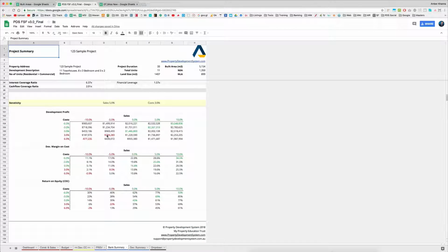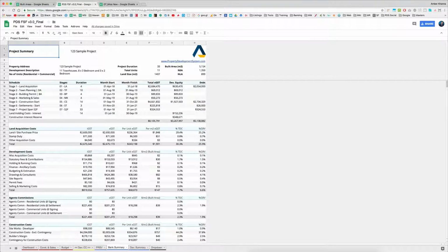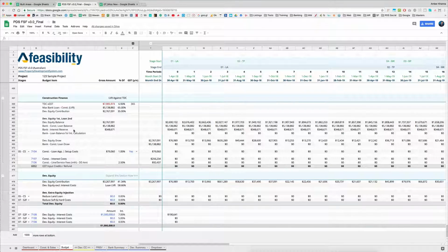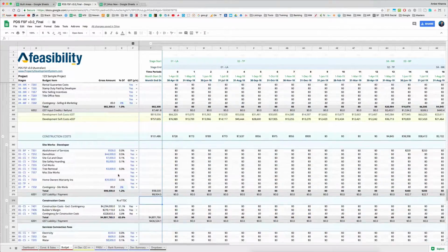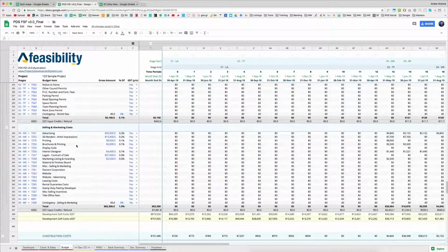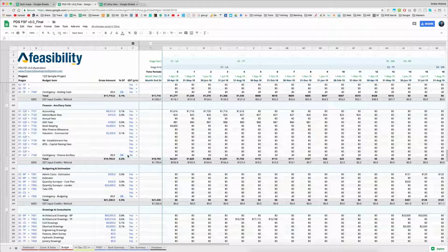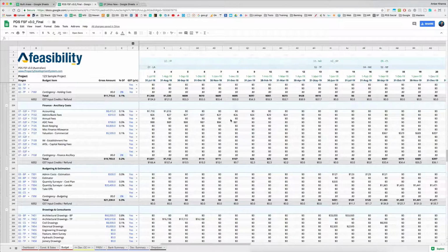And as you go down, each summary comes with a sensitivity analysis that you can do. And apart from that, all of these cost heads that you've got, you can actually allow for contingencies as a percentage of all the total costs individually to each one of them, or you can blanket them. There are many different ways that you can actually tackle all of this.